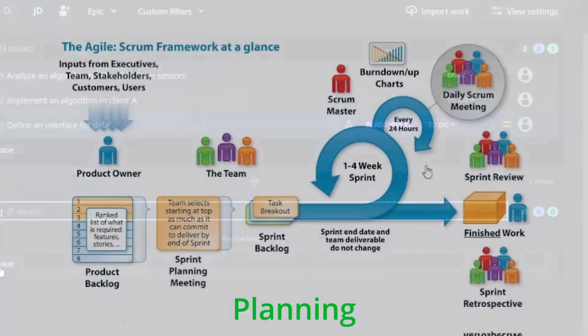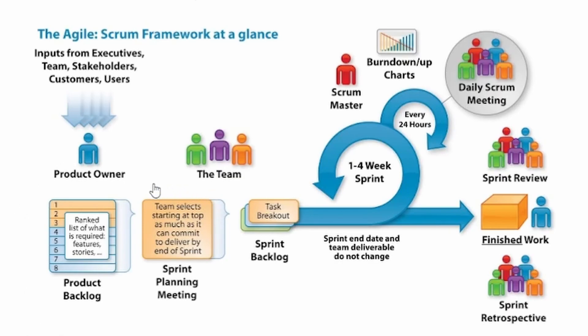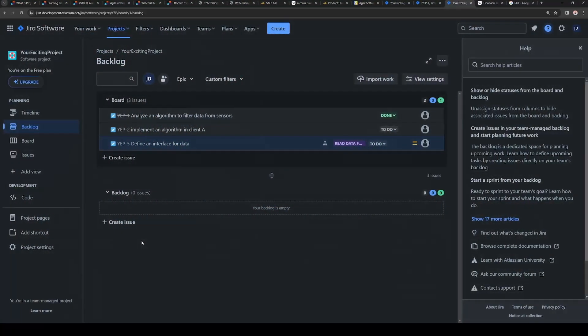The planning. Usually we have the sprint planning and also backlog refinement. There are two meetings when we are planning our work, kind of, or we are predicting. Quite often the homework is done by product owner which is gathering information from stakeholders, customers, or users, and then providing this information kind of as an input data to a team. And then together with product owner and scrum master, we are planning what should be added to a sprint or in the backlog.